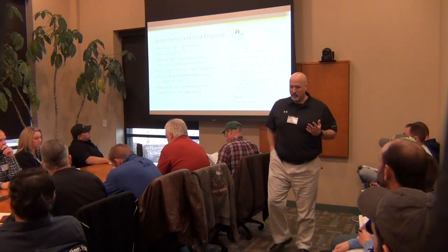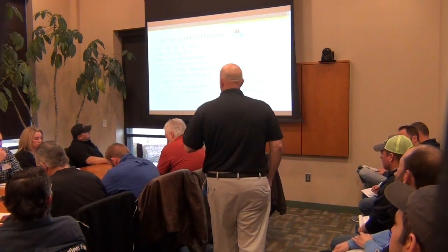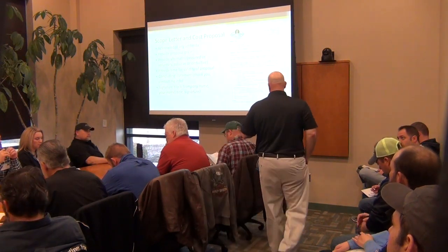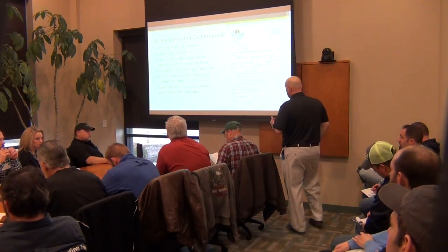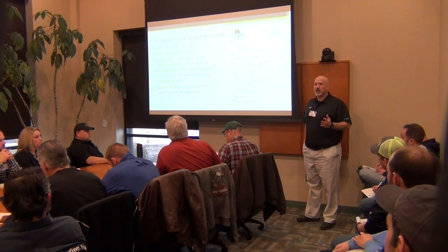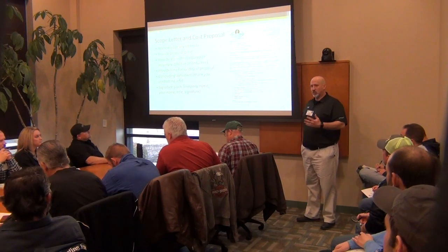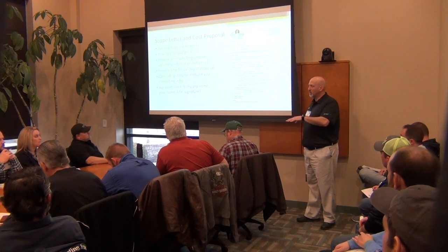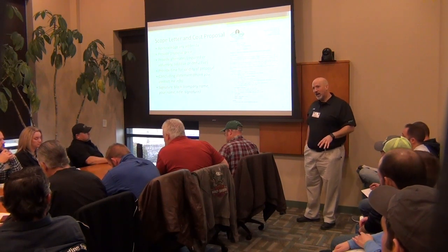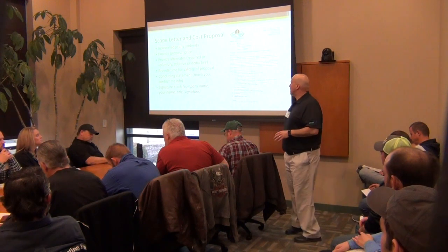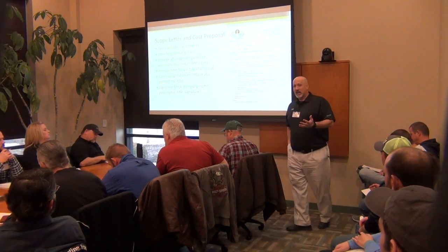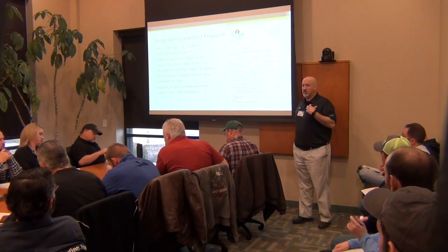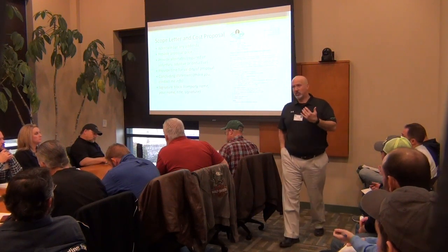One thing that I see commonly excluded in a proposal, that I like to always have, is your bond. If you can bond a project. I think you're seeing it more and more, especially after the Great Recession we had. Companies went by the wayside. A lot of owners and general contractors are more in tune and concerned about who they work with. You want to make sure you're viable, you're going to be around, you're going to finish the project. So we have a policy: anything over $250,000 we bond back. So we ask you to bond the project.